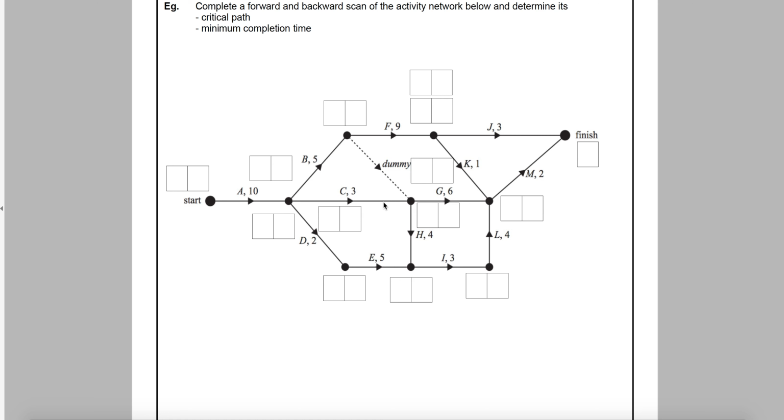So when there's possible paths that open up, it means that there are obviously predecessors that we have to keep in consideration. When you do activity G, you must remember that B is a predecessor of G. Same with H. Let's have a look at it. See here? Because this is connected, it means that G is not starting until this happens.